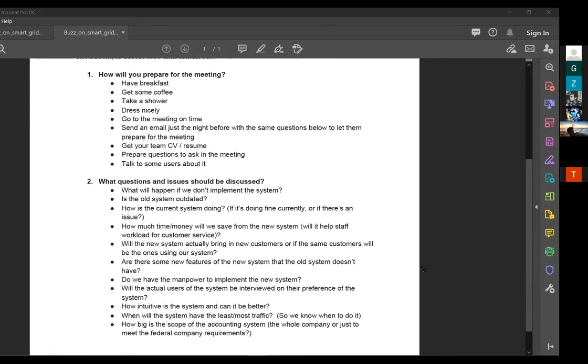And as for the accounting information system, most projects in this case are not a whole waterfall. We live in the world of agile, right? Most accounting information systems usually have modules for each report. Therefore, it would be great if we could identify the dependencies that lead to the module which is required for the federal revamp and work on those. And after we're over the mandatory phase, perhaps we can reach another decision whether we could capitalize on the CRS or should we continue working on the AIS system.